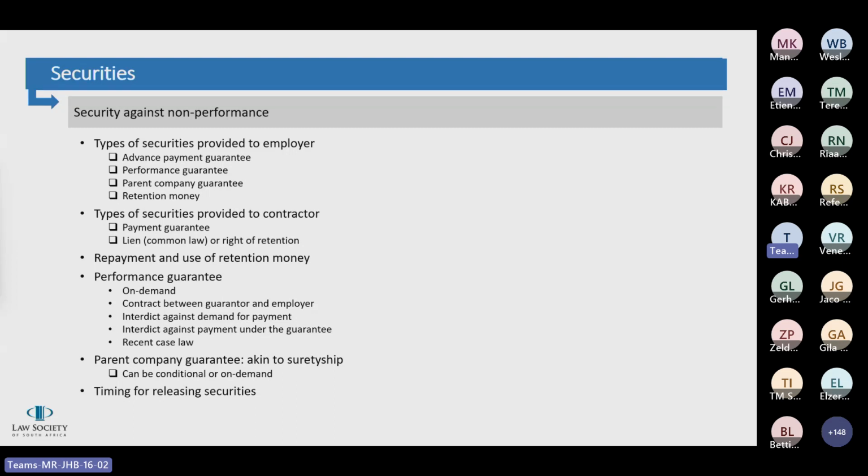It is accepted in South African law, contract law generally, that a party may interdict another party from breaching a contractual term. However, within the context of an on-demand guarantee being autonomous from the underlying contract, the courts are required to uphold the autonomy principle, and a breach of the term of the underlying contract should not readily be accepted by our courts in these types of interdict applications. So lately we've seen a drive for South Africa to start adopting the Australian and UK courts' perspective on this.